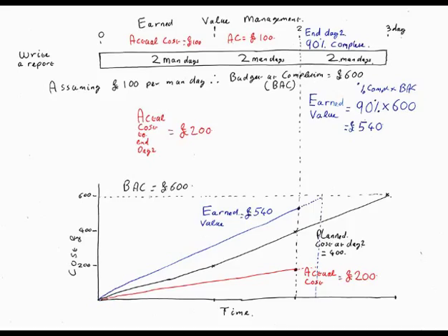The other disadvantage is change. It's quite difficult to manage. When you re-baseline the plan, all the earned value curves go wobbly, especially if you start breaking work packages up, because then you've got to decide how to attribute them. More work comes in, more work goes out. I think the consequence is that it encourages people to not change the plan, and just carry on and kind of fudge it. I think also the jargon is a barrier. In the book we've got all these definitions of jargon, and we've just been through it before we started the podcast.